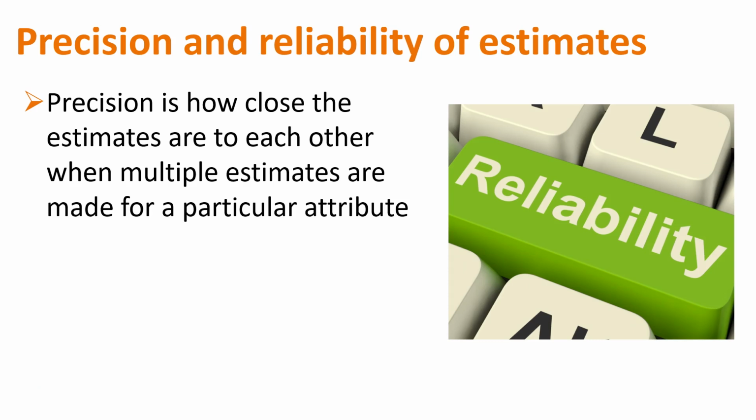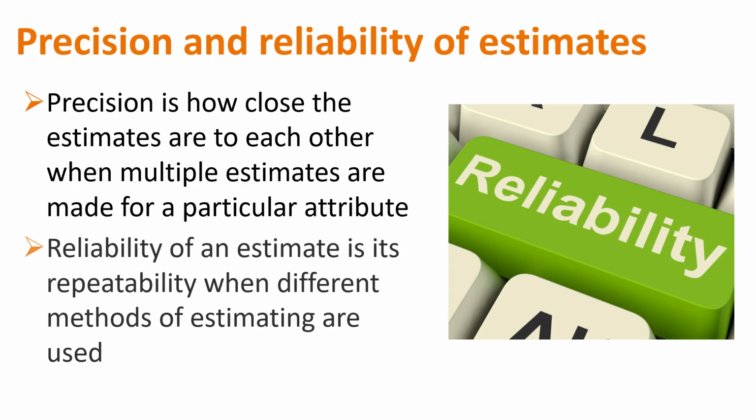Okay, how close estimates are when you look at multiple estimates actually tells you if you don't know enough. If you've got people all over the board, that means we don't know enough, or maybe the group together collectively doesn't know enough. Then how reliable is it? If I do wideband Delphi versus some others, right? The BABOK doesn't have all the different things because there are different ways you can go about it. Like I said, I took a whole 2-day class on this and we're covering it in like 25 minutes.